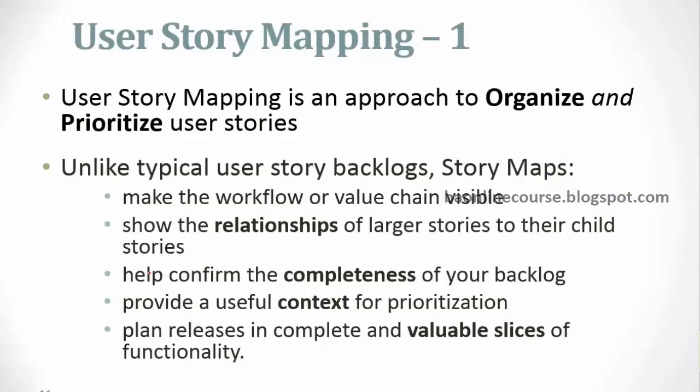First step, we would create a workflow of all those features or functionality that needs to be delivered. So what you do is you pick up the broader or the high-level activities and then create a workflow out of it. Like let's say a typical system maybe would have a registration process, and then maybe an order placement process, and then maybe a payment process and delivery, right? And finally some reporting.